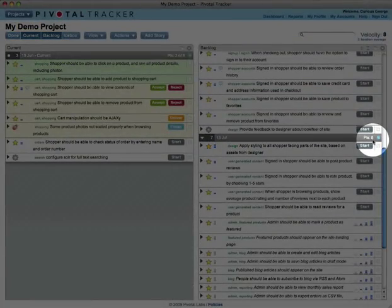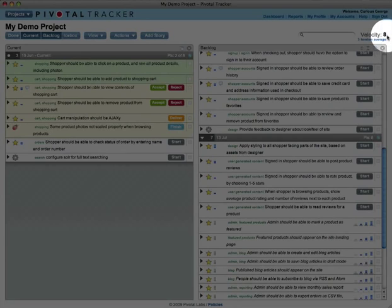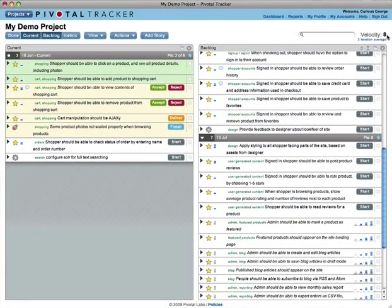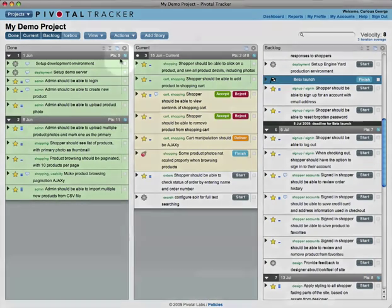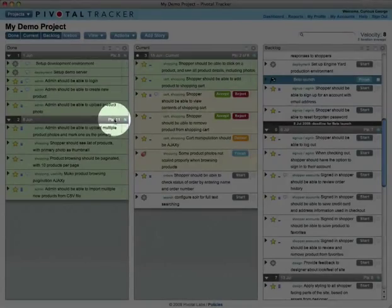This is your velocity, and it helps Tracker predict how much your team will complete each week. Your velocity is the average number of points accepted in each of the past few iterations.